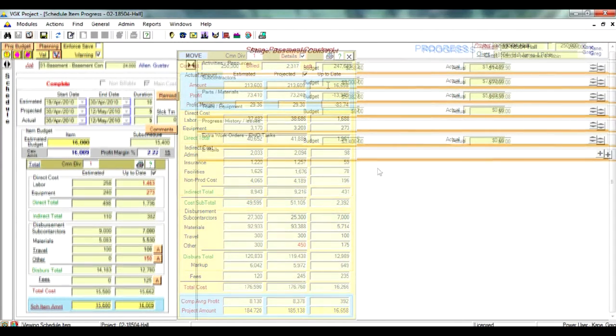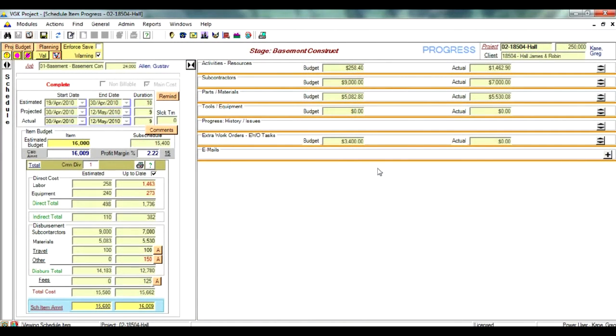Budget values developed at the planning stage give management a reliable reference point to evaluate project performance. In fact, the user sets a budget target for each task and during the project run can evaluate task performance against the set target. Note that actual cost information is reported alongside the budget for each component. This allows you to monitor and control spending on the individual component level and quickly identify a problem if one occurs.